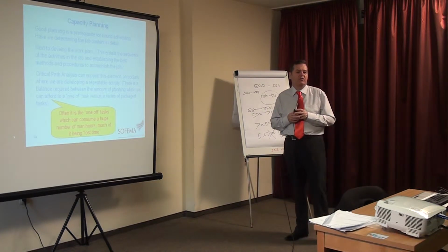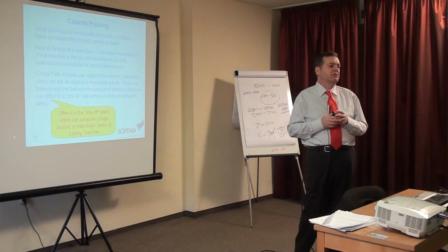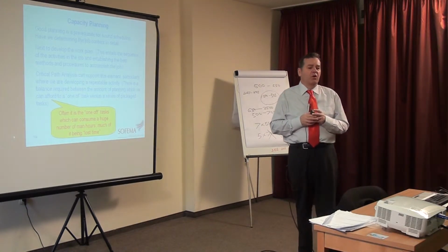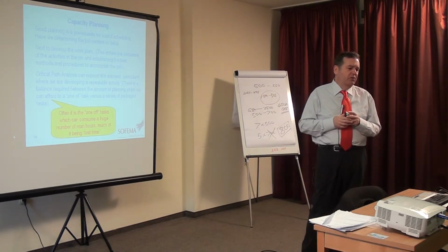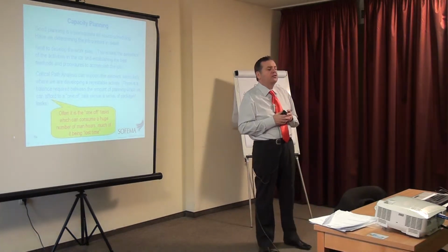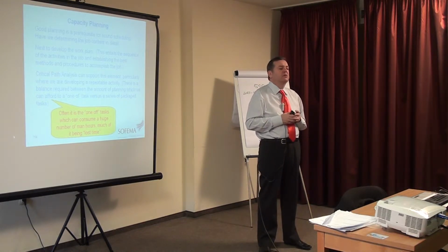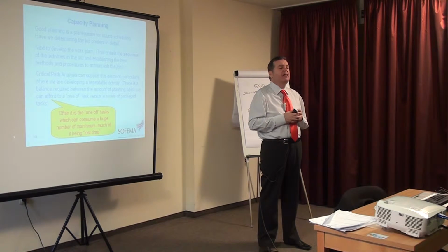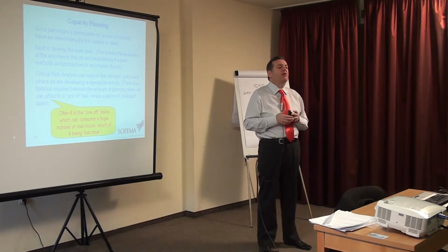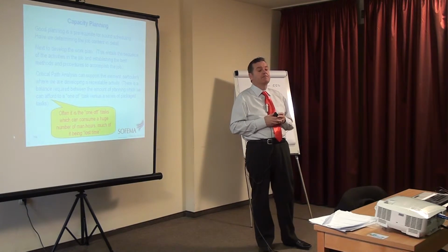Are you familiar with critical path analysis? Yes? No? What it's looking at is what we have to do to not impact the timeline. For example, we bring the aircraft in the hangar. Can we start before we bring the aircraft in the hangar? No. So that is on a critical path. We must bring the aircraft in the hangar.